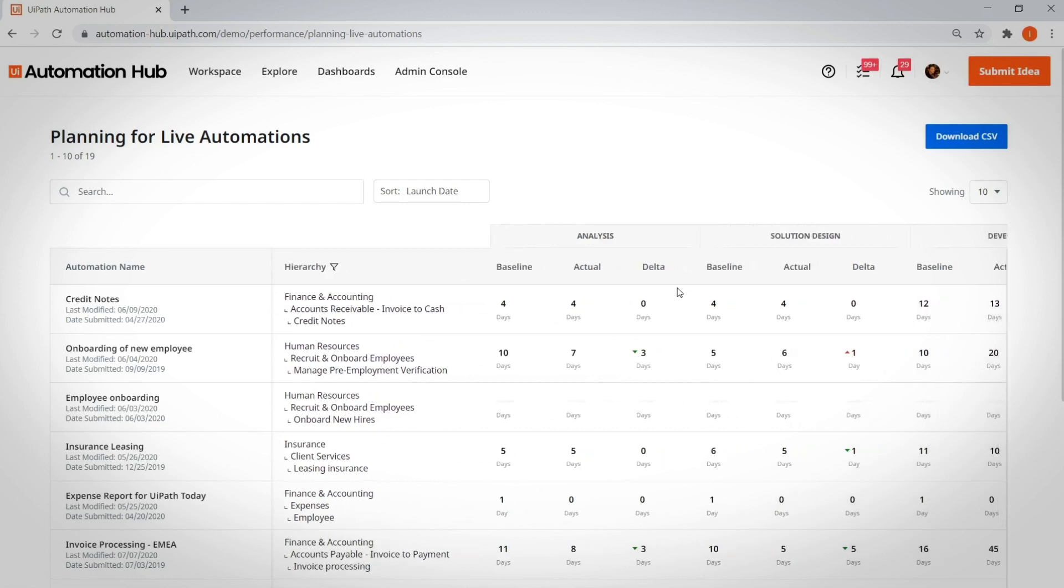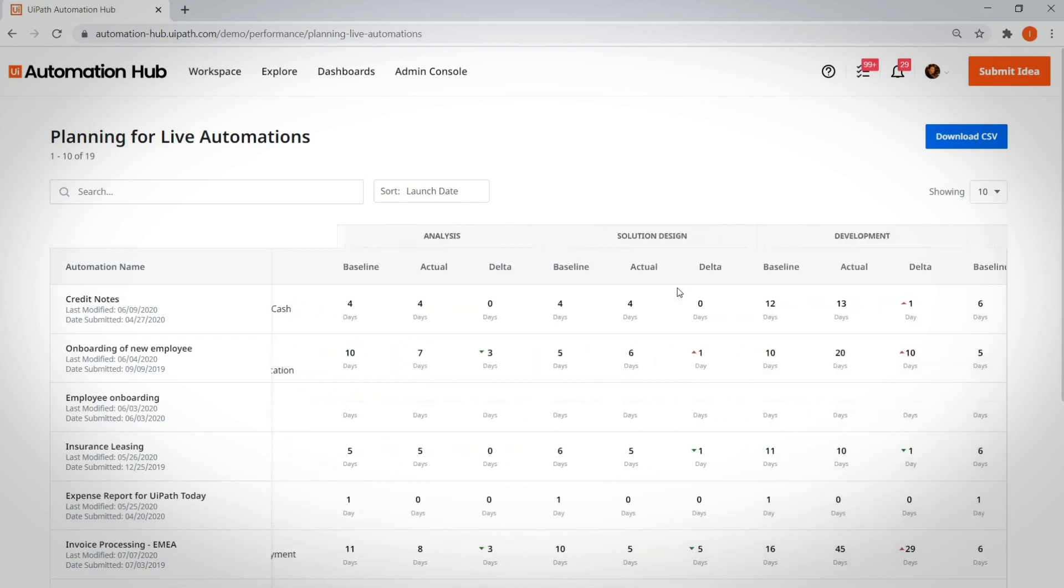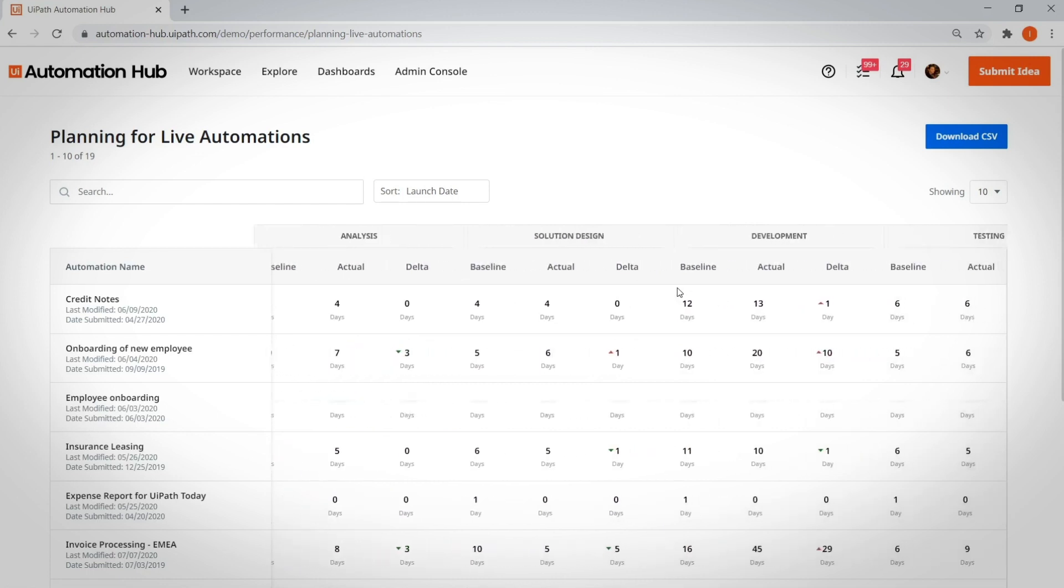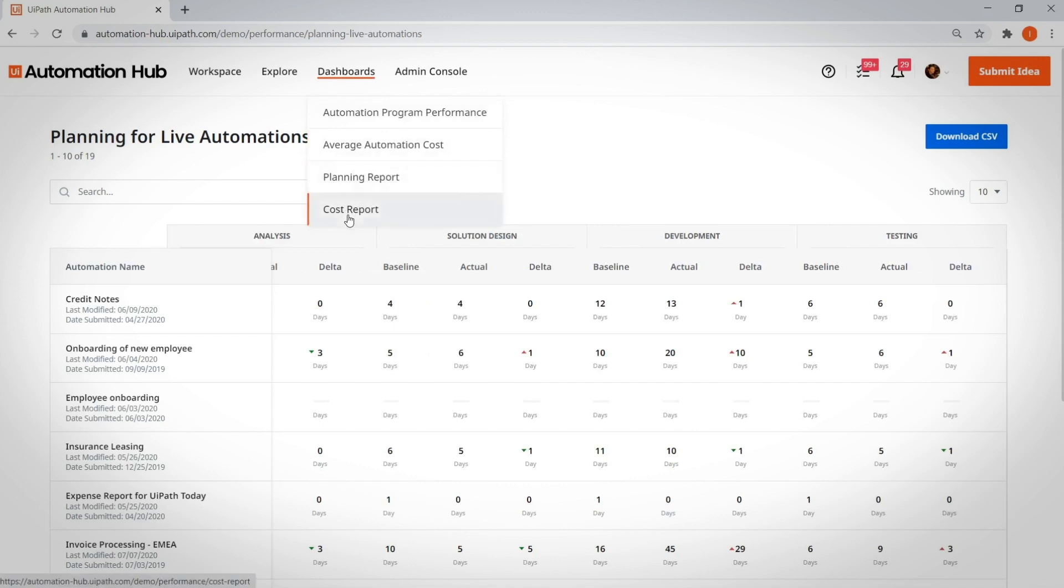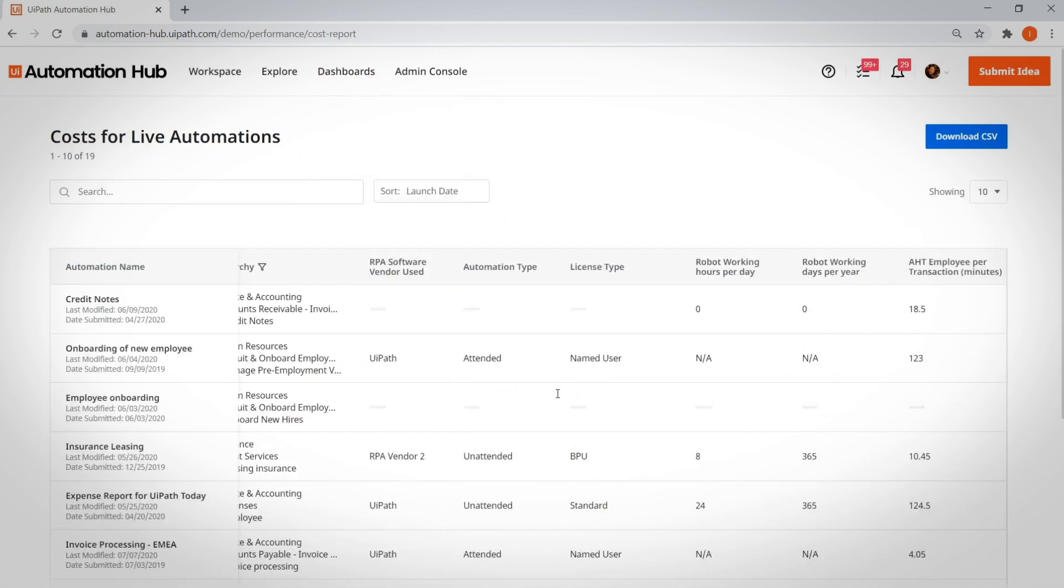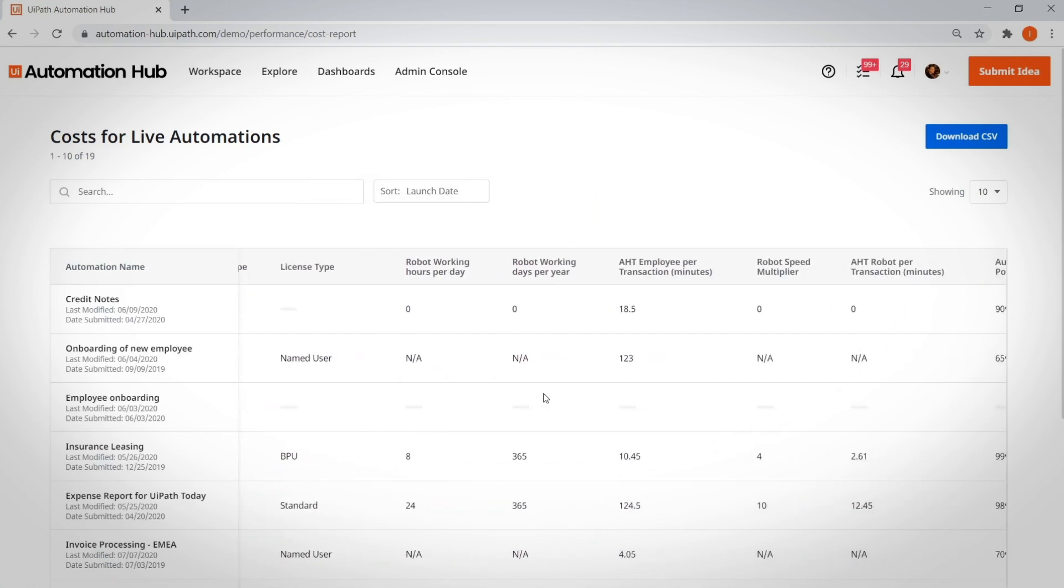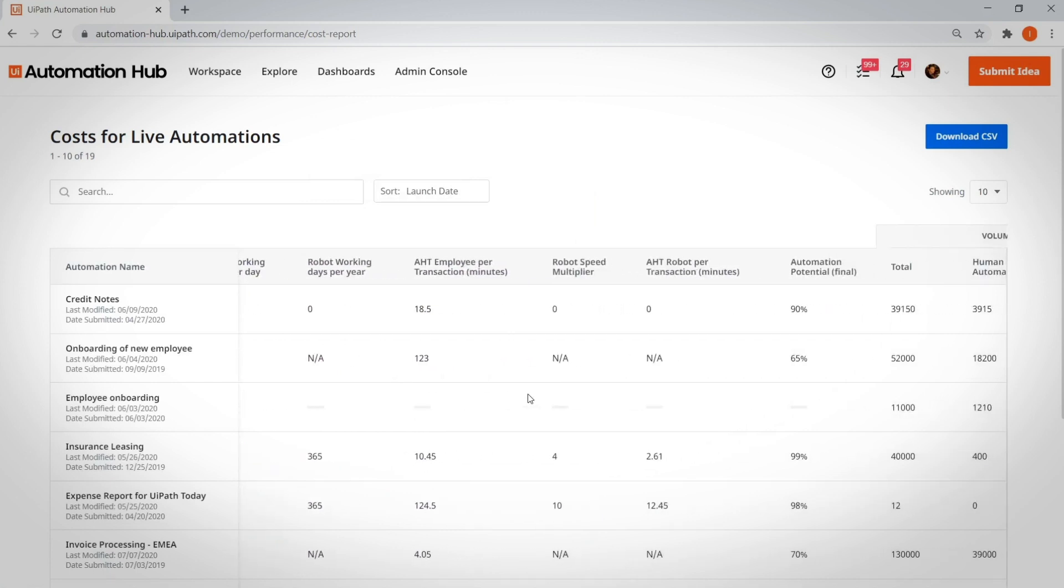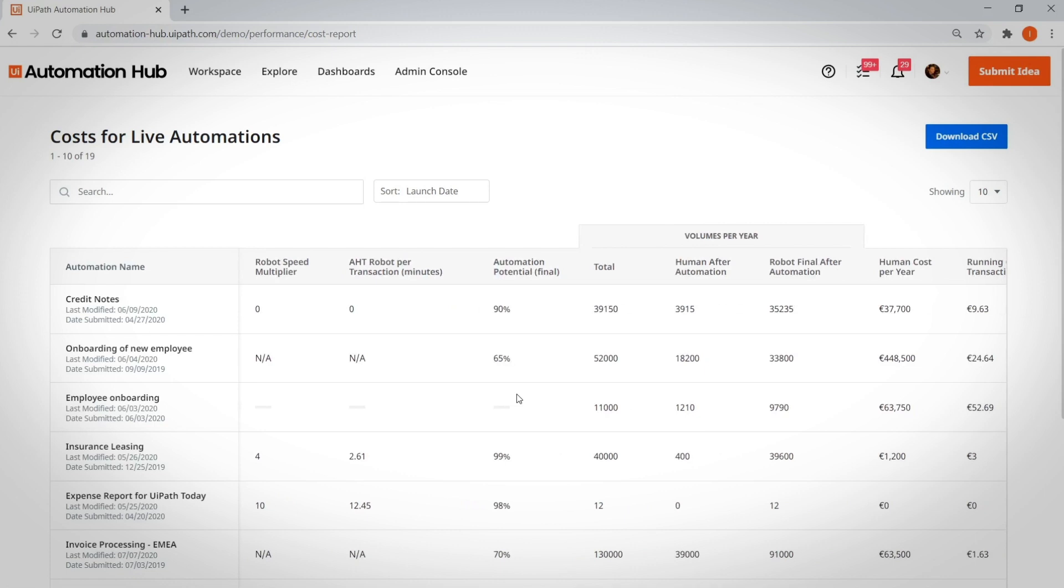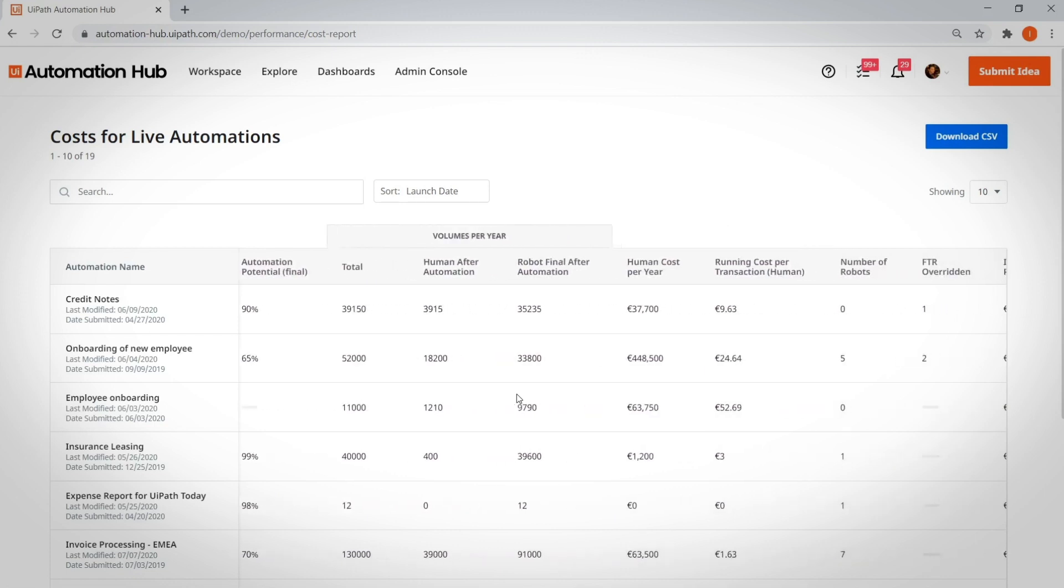and delta for all live automations that helps you determine how close your estimate was to reality. The cost report is available for users with program manager and system admin permissions. This report provides an aggregated view of all the live automations and the cost that they're generating, split according to the types defined in the cost catalog.